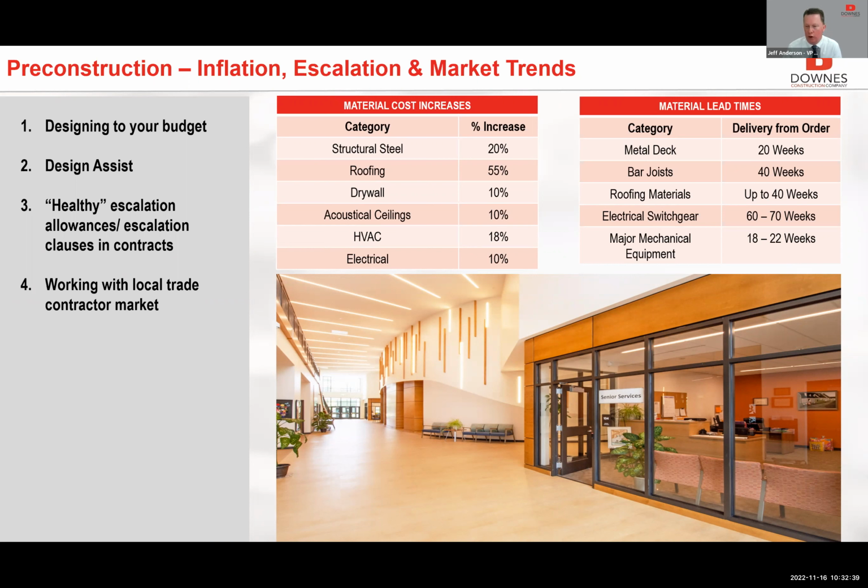And then, as mentioned earlier, both by Dave and Joe, extensive lead times. We say at this point, certainly a job that has brand new electrical switchgear, as David mentioned, we can't complete projects in a year because it's taking a year just to get the electrical switchgear, the transformer, and generators, for instance, on certain facilities. So we have to plan that in. We have to understand that at the beginning in the pre-construction process so that we're augmenting the schedule, augmenting the budget to be able to incorporate those types of things.